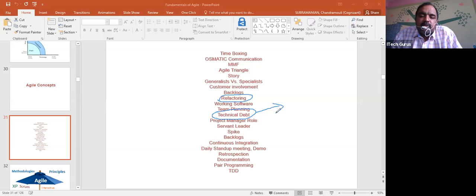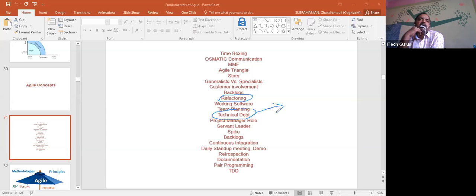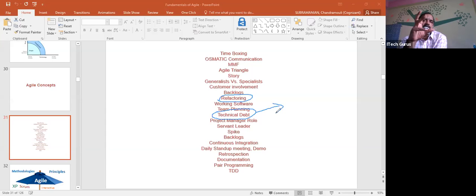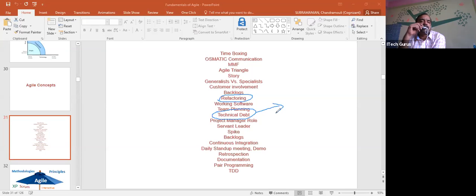You're able to understand this? Or you want me to repeat again? Could you repeat it again, sir? Okay. See, how many hours did we talk about per sprint? We just took a model example, right? 2 weeks with 5 people, around 300 hours per sprint or per iteration is what we estimated, correct? So the maximum work the team can do in a sprint is 300 hours. So in 2 sprints, how many hours can a team do roughly? 300 plus 300, 600 hours.